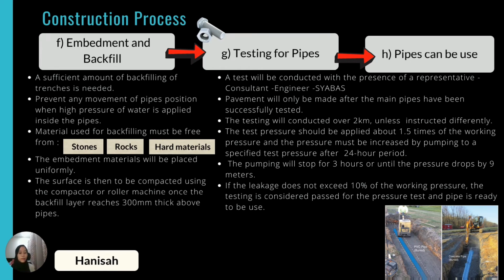So, the contractor needs to identify and repair any leaks formed during the pressure test or after that, as well as to make good any joints to the client's requirement, where retesting is required if the client says so. Therefore, all testing will be inspected by the consultant, who will then issue a certificate certifying the pipeline as having passed the pressure test. A constant checkup is also needed for the contractor to monitor the performance of the pipeline as well as to avoid any leakage happening in the future.